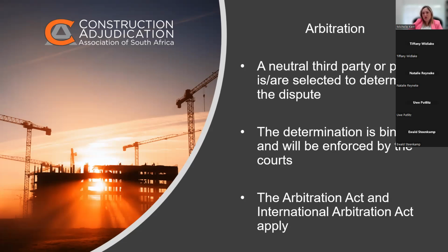It's that arbitration, if you've chosen arbitration as your alternate dispute resolution to court, is usually the final port of call. And you'll see there I've said the Arbitration Act and the International Arbitration Act apply, depending on if it's local or if it's international, which is very different from the other alternative dispute resolution mechanisms we've discussed.